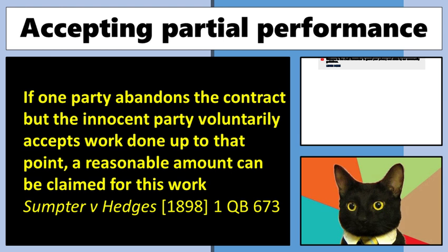15% of the work of building this house or whatever it was. And you think in common law, well, the answer is no. You've completely breached, a substantial breach. And again, we talk about the breach of contract. You're not going to be able to, if you're the party in breach, go and seek some form of compensation from the other side.